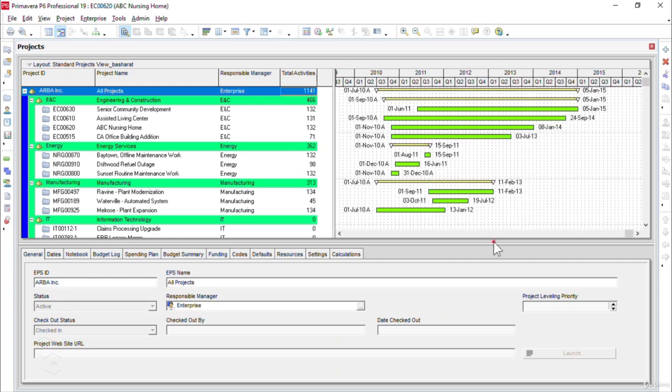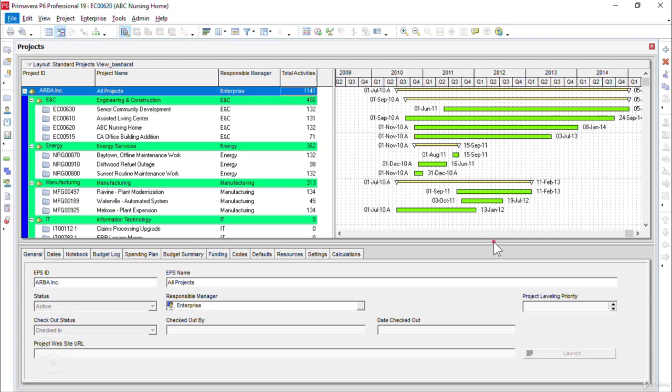Gantt charts are used to track the durations of the projects, starts and end dates, activity durations, and activity starts and end dates. And these are also used to show the relationship between the different project activities that exist in the project schedule. Another important point: if the bars in the Gantt chart are not getting displayed properly, then from the top in the toolbar, we can use the zoom in and the zoom out buttons to adjust the bars as needed.